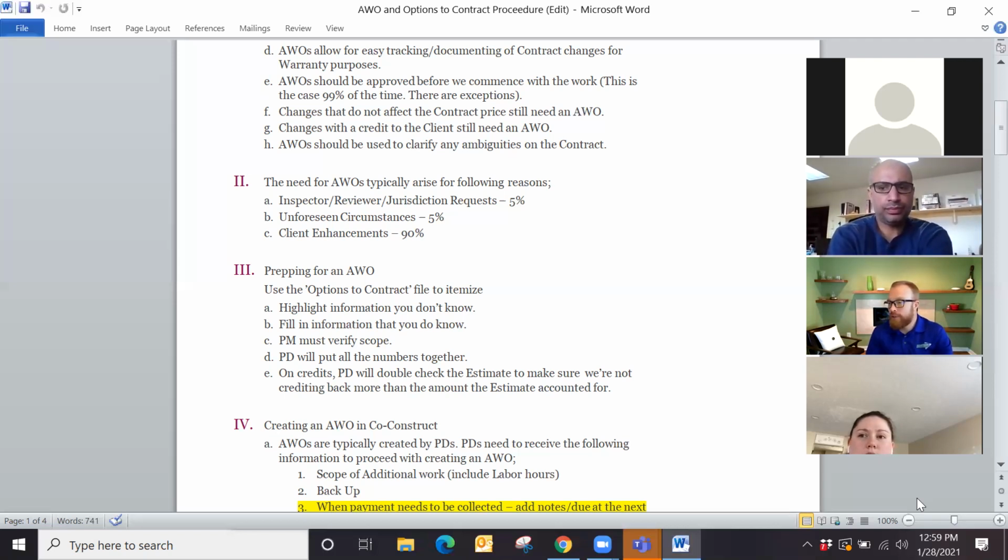I don't know the specifics on that, but that's about what it was. It became the norm for 10 days. So whatever we were quoting the clients then was not going to be accurate. And so specifically with the COVID clause, we added the clause, and in this particular case, like in Jack's example, they initial that. They know that that's one item that could take place.